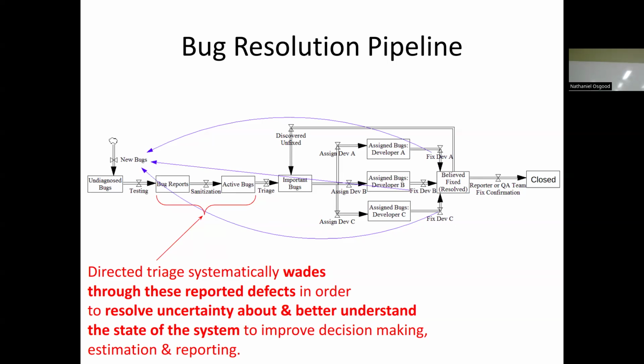You'll have 3 people who know this area of the code base clustered around, sharing their screen via Zoom and talking about how they're going to fix it, seeing if others have any concerns, and actually doing pair programming to fix that defect. Make sure it's done right to prevent a circulation of defects where suddenly we have a new one.